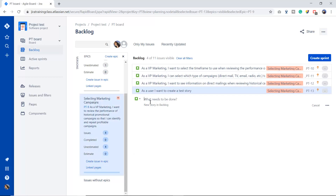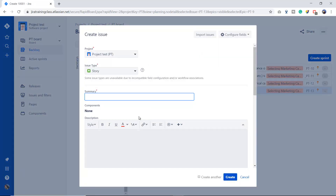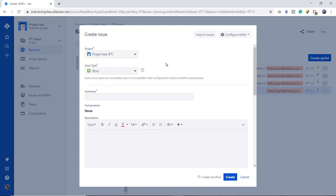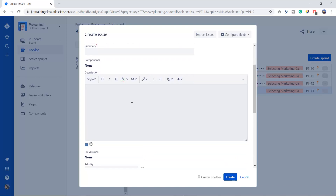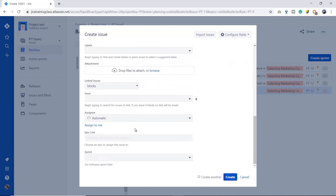This is the first way to create issues under an epic. The second way: once you click here it gives you a window, and you can choose the type of issue — right now I'm choosing a story. You can also check your project — right now I'm using project Test. Once you write the summary and description and scroll down, you can see the epic link is already mentioned there — the epic name is already there. This is the second way you can create an issue under an epic.